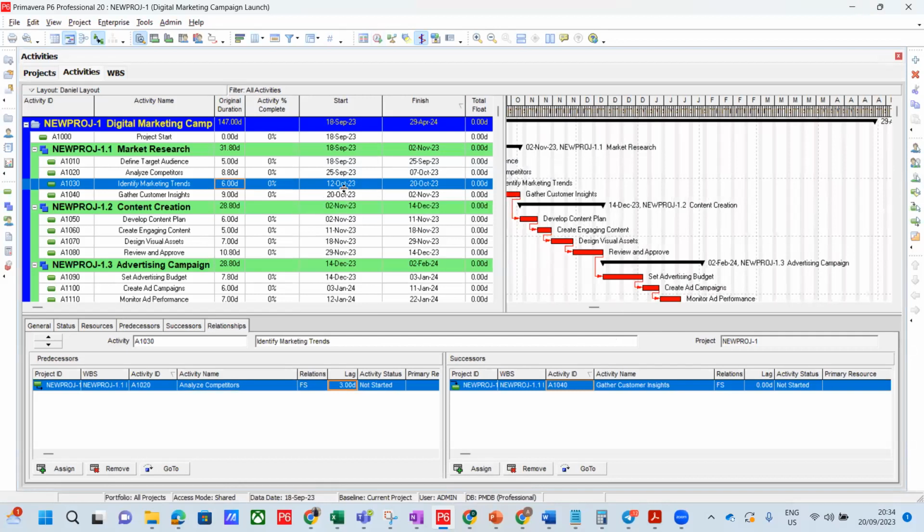You can see it has moved. It's looked at the calendar. If you look at the 7th of October, it depends on the calendar you're using. So it will count 3 days. If you've blocked the weekend, it won't count the weekend. That's why it's jumping to that, right? Do you understand that now?